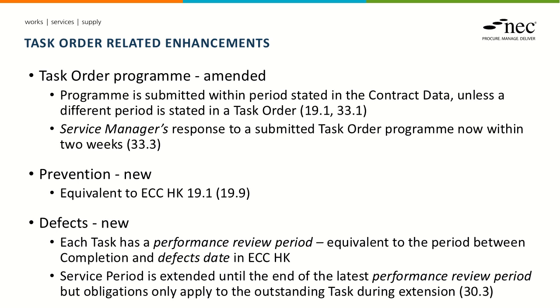We've amended the response period to the task order program. It used to be 1 week. We've changed it to 2 weeks. So that's the same as the ECC response period.